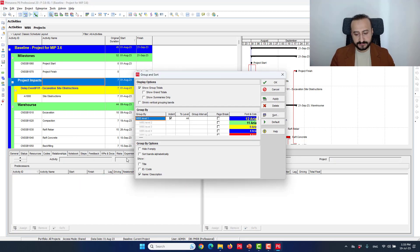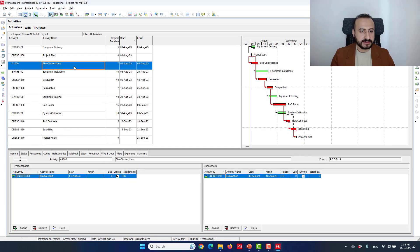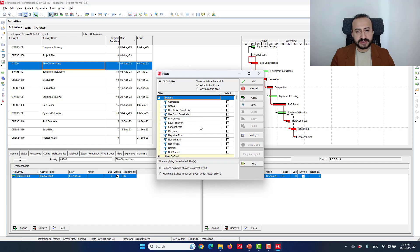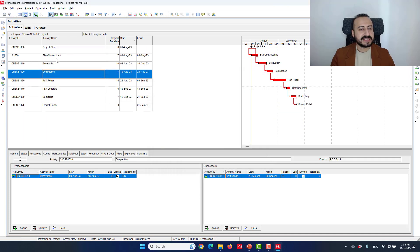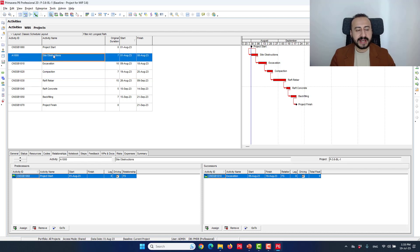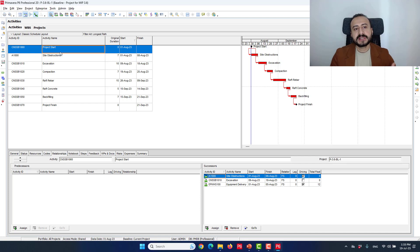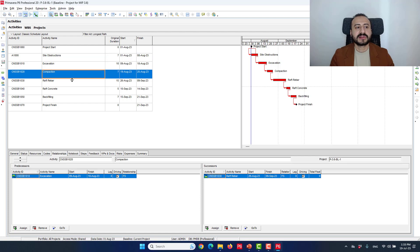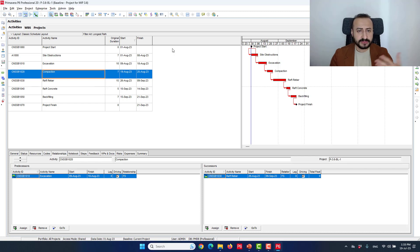You can also go to Group and Sort, delete existing grouping, click OK, then right-click, Filter, and filter by Longest Path. We can see the new activity we just added. According to the RP, after running the schedule we look at the longest path and analyze it, which helps in our comparison. You can also assign the baseline here to make a comparison if necessary.